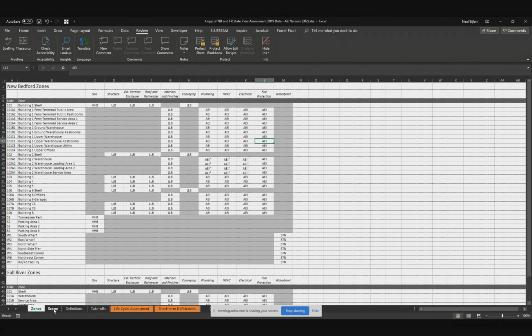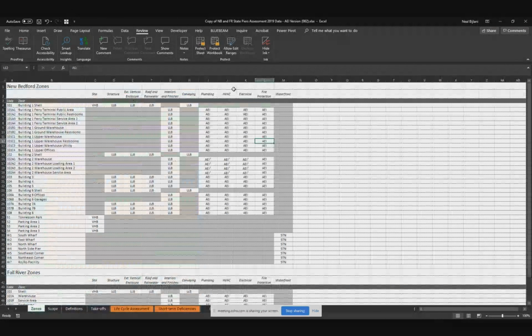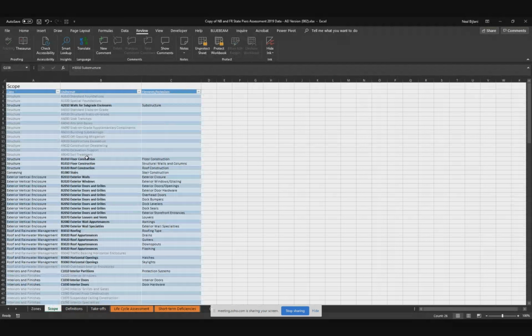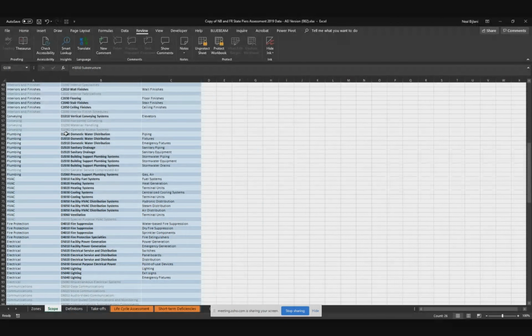Okay, so now within that, what are they looking at? Let's just say this plumbing person. What are they looking at? So there's this whole coding system called the Uniformat. This is a standardized numbering system that we use, and it's in number D20. So they own D20 to D2060. That's usually plumbing. Oh yeah, I already did that here. See, plumbing, on the left side.